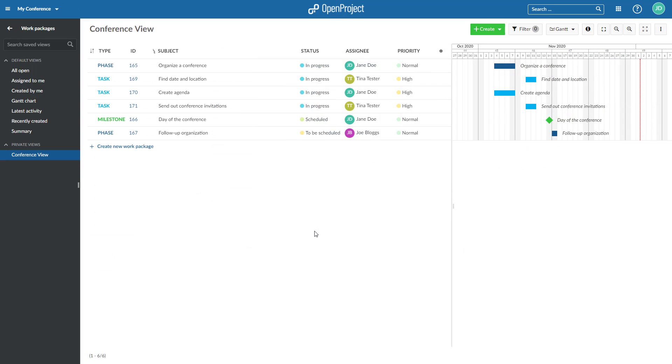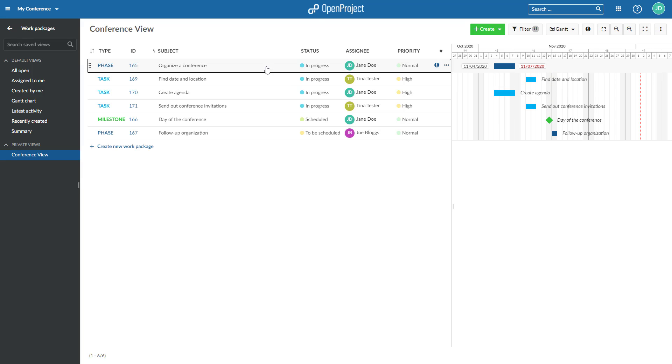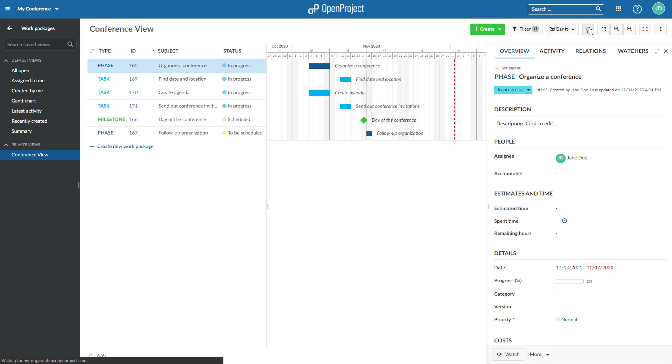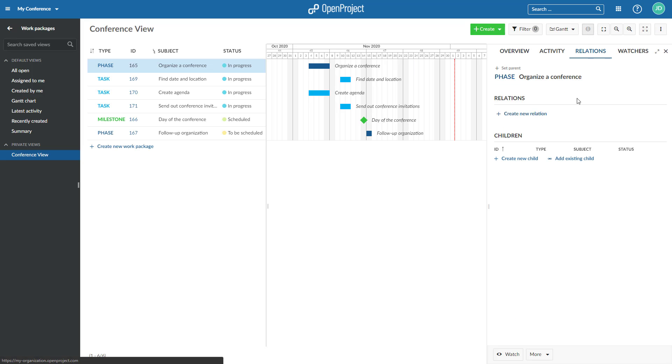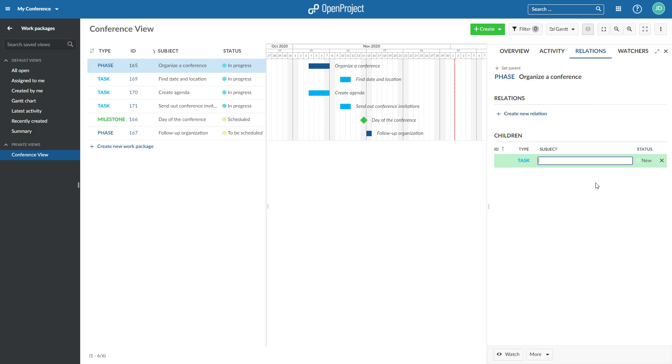There are three ways to add or create a child work package. Create or add an existing child work package on the Relations tab in a Work Packages Details view. Open a work package and select the tab Relations. Click on Create New Child to create a child work package.